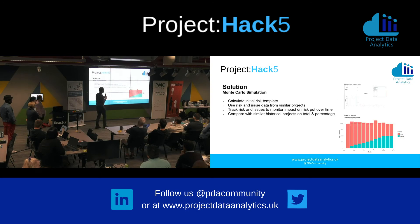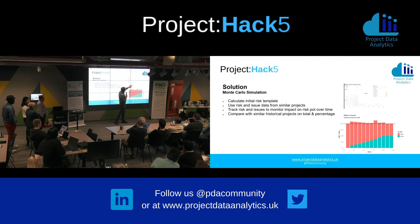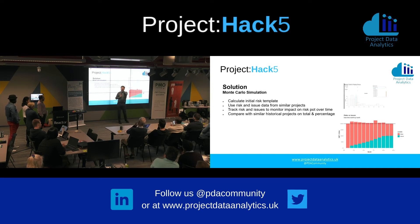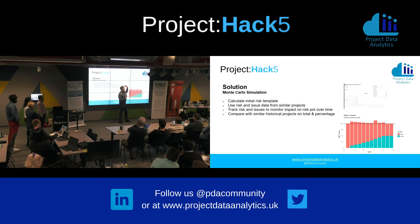The basic idea behind Monte Carlo may be known to you. You take that whole list of risks that your experts provide, and you say, okay, I know a range that each might fall into. You run a simulation multiple times and you get a range. Then you can answer the question the project manager wants to answer: how much contingency do I need to put away? You can tell them, well, 80% of the time — based on the data we have — you're going to have less than whatever the number is, say 2 million pounds.